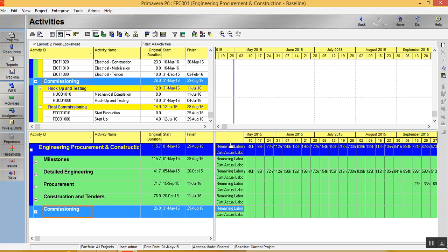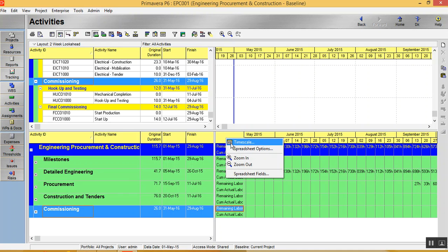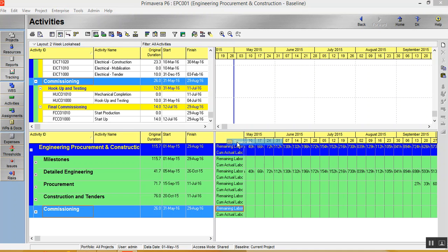Now I'll just quickly tell you how data can be exported or it can be customized. For S-Curve, you require a time scale. So I'll just tell you how to set the time scale. Now you can see your time scale. It's a month and it's divided by weeks. So simply come here, right click, time scale.